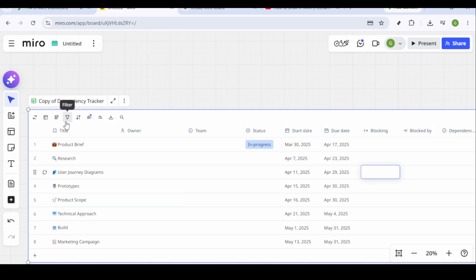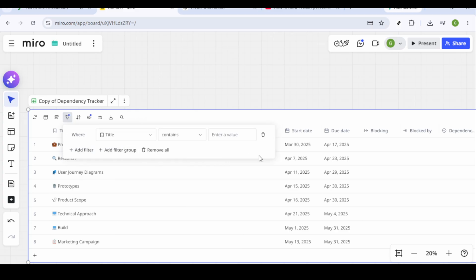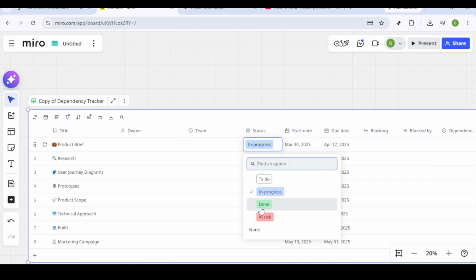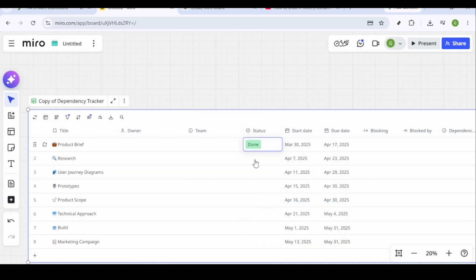With your tasks mapped out, you can now organize your workflow using the Kanban method. This involves creating columns labeled with workflow stages such as to do, in progress, review, and done. As your project moves forward, move your tasks across these columns to reflect their current status. This visual progress tracking keeps everyone on the same page and clearly shows what needs attention at any given time.